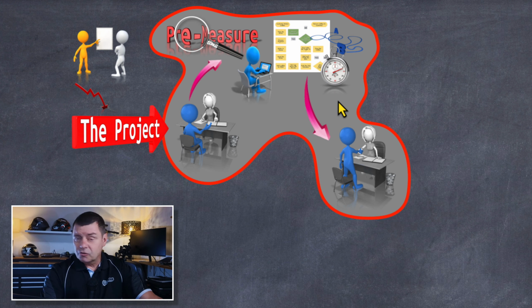And then at a later point, you're going to get buy-in to the solutions and the actions that you're going to take. They then go back in the third step, and they have a meeting again with the project sponsor. The purpose of that is to take that plan to the table, and they're going to set up an operating agreement. An operating agreement is basically an agreement that has two parts to it. It's an agreement around everything that the sponsor needs in order for that project to work, in order for the project leader to meet the values of the project sponsor.